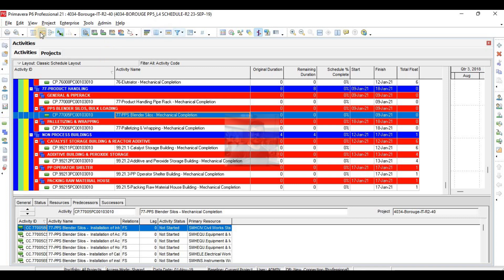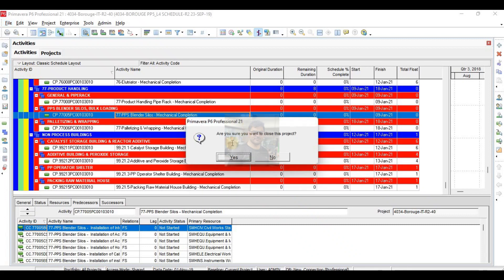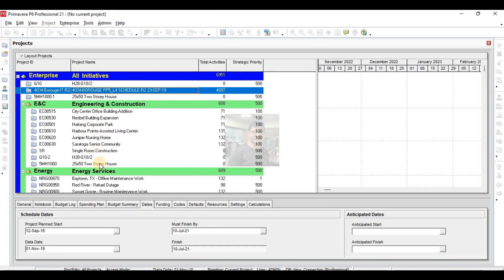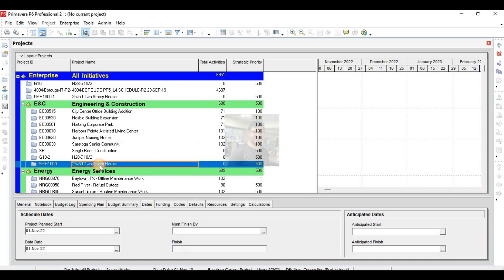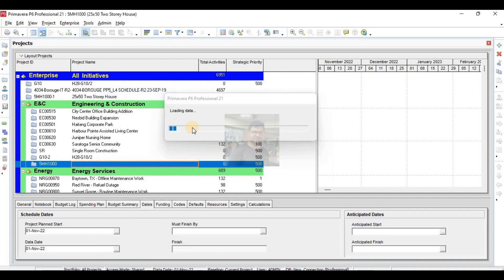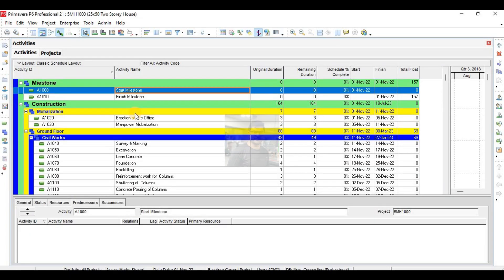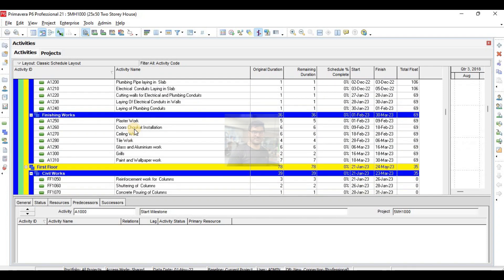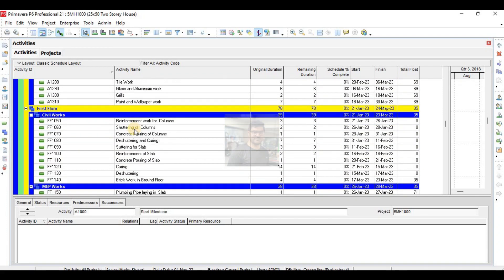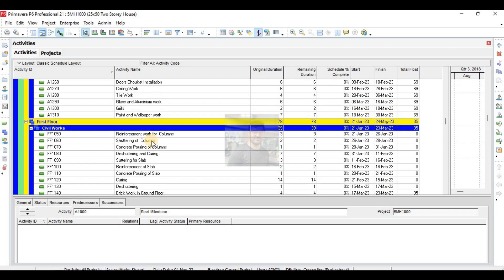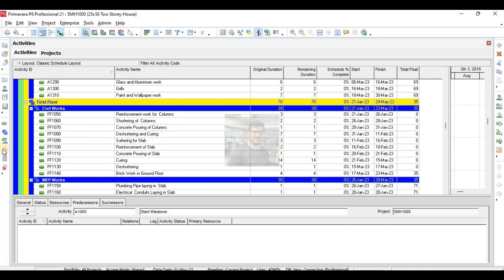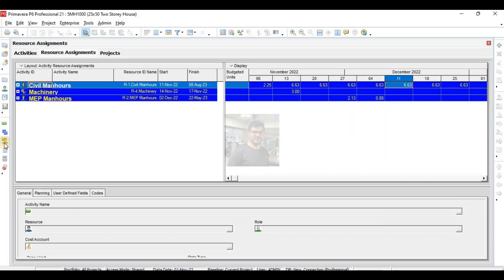Now I will close this project and come back to our own project which is 25 by 50. The next thing is how to make a resource histogram of your project. I have defined only three kinds of resources: civil resources, MEP resources, and machinery resources. From here I will go to Resource Assignments.